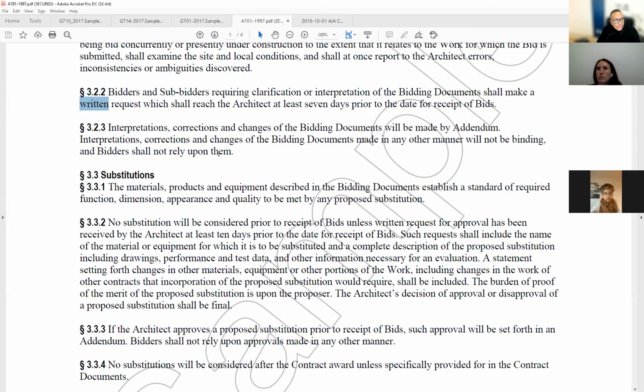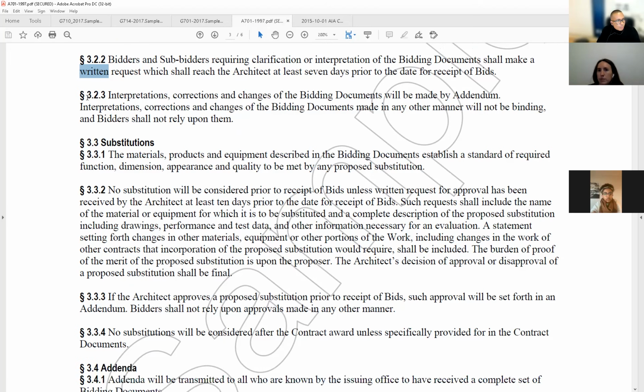We shall reach the architect at least 7 days prior to the date of receipt of bids. They can't just do it the day before. I mean, who are we? We're not gonna shake up conform sets and answer questions overnight. No, 7 days, buddy.